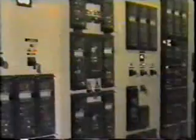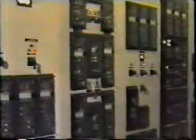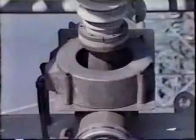In the last segment, we noted that relays are calibrated independently of the CTs and VTs that provide source information. However, we may have a perfectly calibrated relay, but this will not function to protect the system if it's receiving information which does not accurately represent conditions on the primary system. For example, the CTs may be of the wrong type, or they may be damaged, or even wrongly connected. A vital part of the commissioning process is to carefully check all of the CTs.